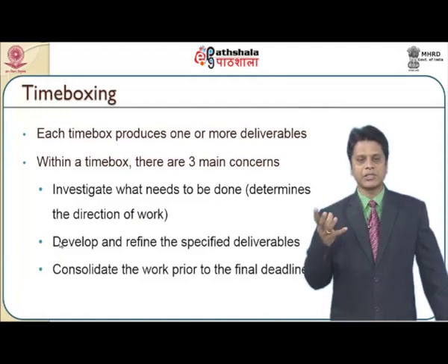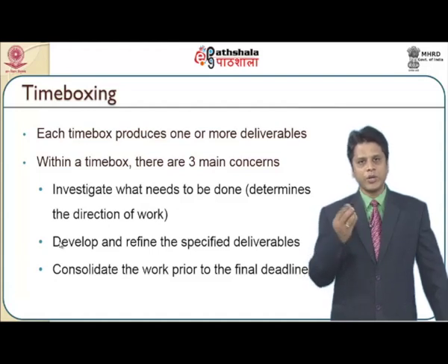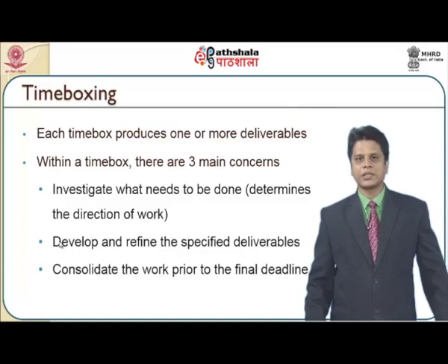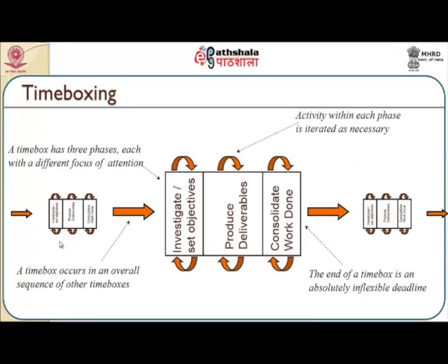As far as deliverables are concerned, for every time box there cannot be only one deliverable; it can be more than one deliverable also. So within a time box there are three main concerns: investigate what needs to be done in terms of determining the work, develop and refine the specified deliverables, and consolidate the work prior to the final deadline. So this is how we do time boxing work, where we have the major phases like investigate and set the objectives, produce deliverables, and consolidate the work done.